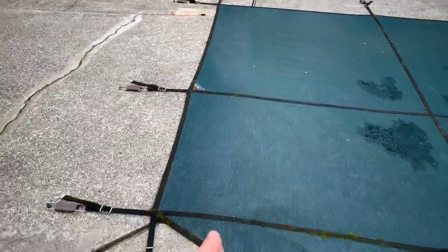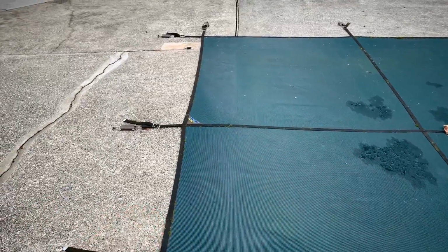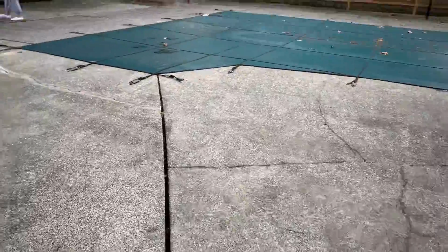That gives us an opportunity to nail a sideboard to the platform board that sits on the top, potentially, so that way we could pour up to it. And then, of course, we don't need any forming on this because there's concrete all the way around, so we'd be able to use that as our forms. Looks like they had some half inch maybe wood in here. I don't know if that's what material this is. Just looks like regular wood they use to create those joints, but we might need to factor that in here and put in some new forms there, or pour right up against it and create it as one. But exposed aggregate.